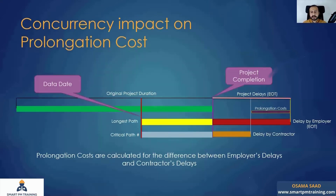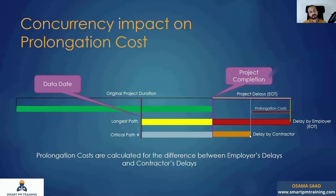He has to maintain those prolongation costs. In this case, this is the EOT entitlement and this is the critical path by the contractor. This is the concurrent delays — the longest path causing the delays. The employer has to reimburse the contractor for the difference between the EOT itself — the three months — and the one month attributable to concurrent delays. In other words, out of three months of EOT, the contractor is staying on the project because of his own default, so as the employer, I am not responsible and should not reimburse him for that one month.